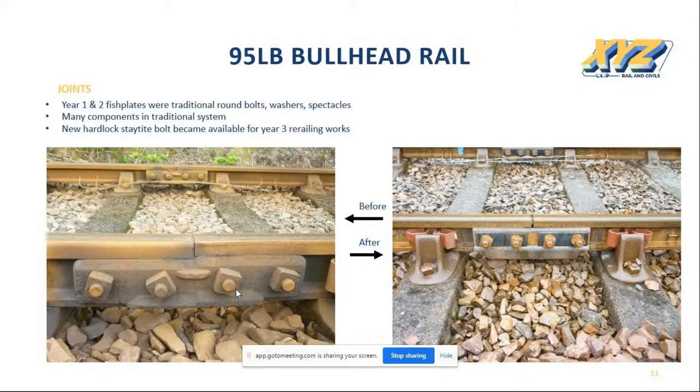The rail was delivered drilled at one end only, but without the holes being cold bolt expanded, or CBX. This is a notorious task with plant breakdowns and a requirement to crop and drill due to holes being off the square. 6,600 holes were CBX'd on the Far North project, and there was only one hole that was wrongly drilled.